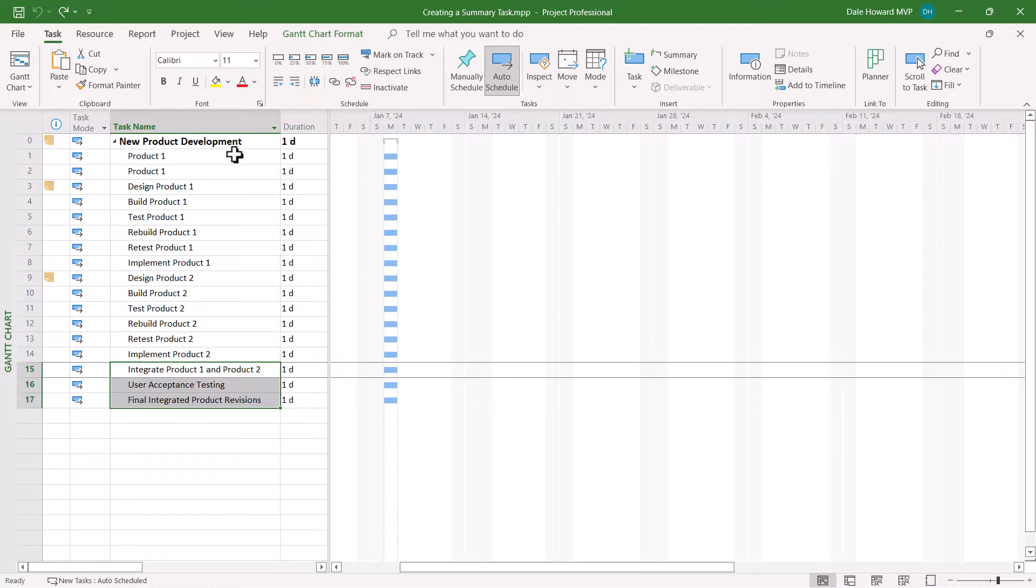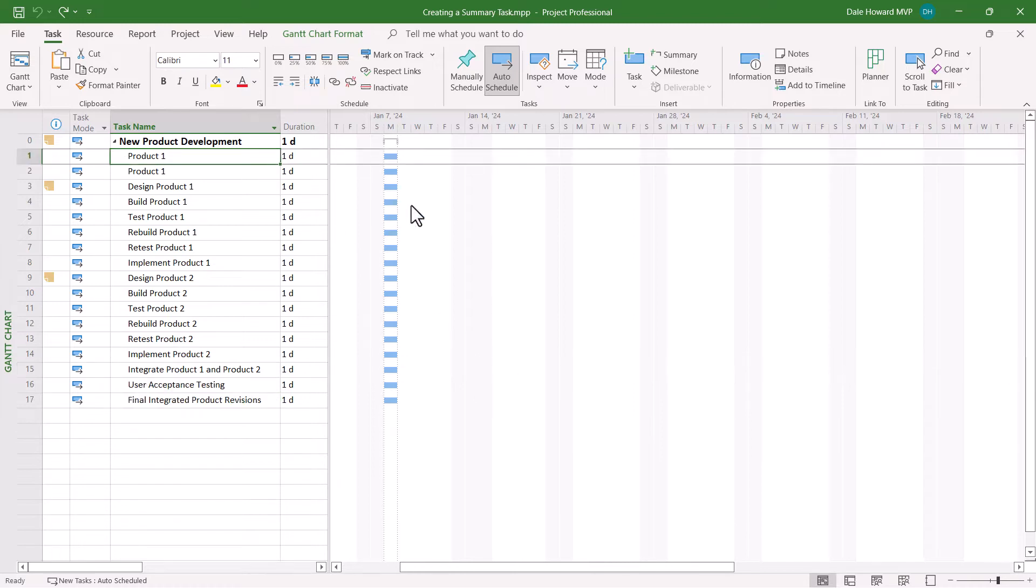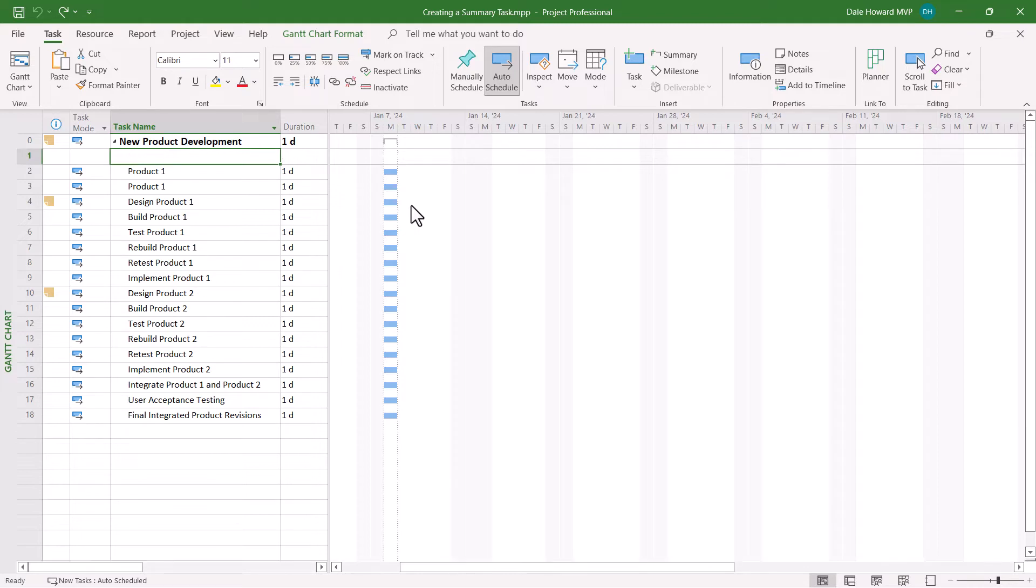In Microsoft Project, there's actually two different ways to create summary tasks. Using the first method, select the task row where you want to insert a new summary task. And then on your computer keyboard, press the insert key.